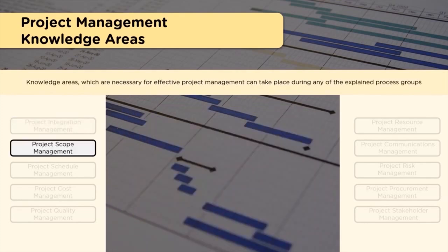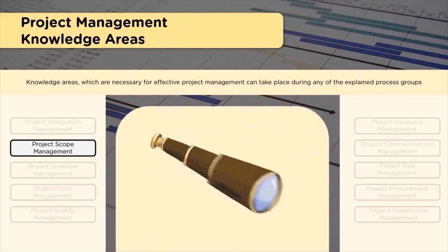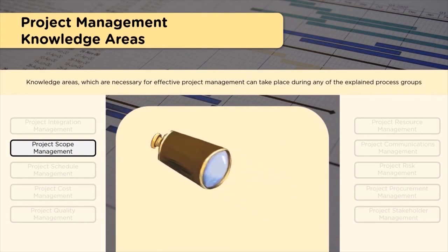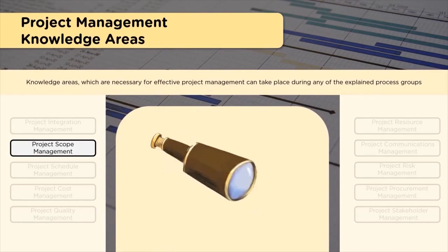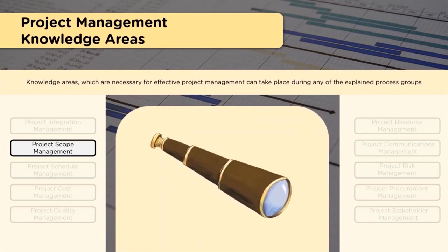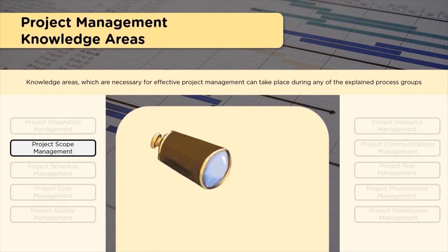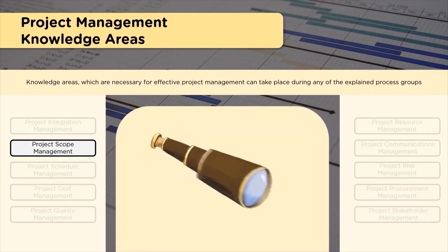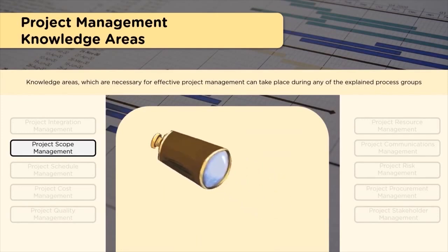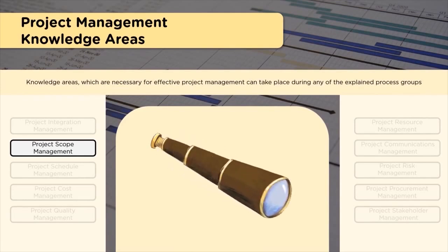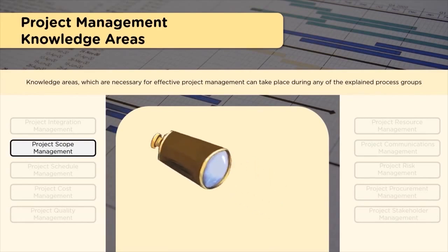So now we will move to project scope management. When we use the term scope, it refers to the boundary within which we need to do something. The first thing we should keep in mind when we say project scope is 2 things. One is the scope of the product, service or result which we are creating, which comes out of a project. What is getting created? So scoping that part of it. The other part of the scope is the processes, the tools, the resources, what is being used during the project so that deliverables happen. So we should look at 2 parts of the scope.